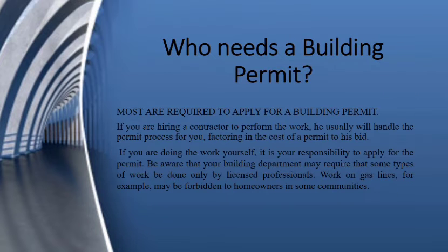Who needs a building permit? Most are required to apply for a building permit. Individuals, firms, or corporations who would like to perform construction works on a particular property must seek the authorization of the appropriate LGU for a building permit. This includes those who are looking to construct, alter, renovate, or demolish a property.